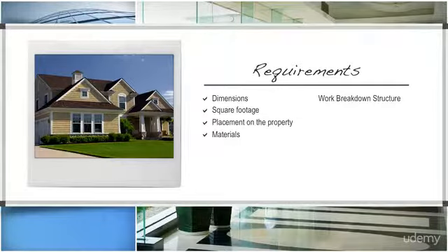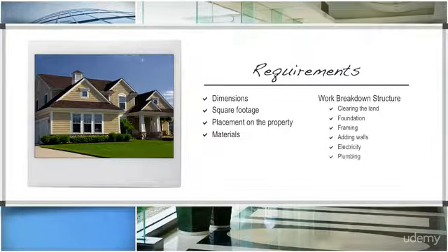Now, based upon those definitions, the project's work breakdown structure will be developed. The work breakdown structure provides a hierarchical illustration of the project, broken down by task to work packages that will come to represent the critical path of the project. Once all the details pertaining to the house, such as clearing the land, pouring the foundation, framing the house, adding walls, electricity, and plumbing are identified and decomposed to the level of work required for each, time management processes will be used to further define sequence, estimate resources required, durations, and arrive at a schedule for work to be driven by.